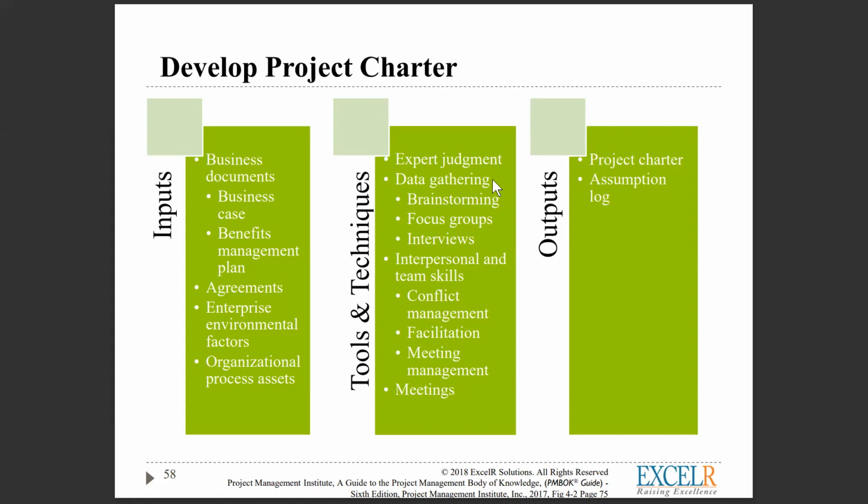Then the pre-sales team will prepare the effort estimation, cost, everything. And then they will prepare a technical proposal as well as a commercial proposal. Once those two things are done, they will submit the bid. The company that is rolling out this offer will call for a technical discussion, and then select the vendor: I have selected company X to deliver my project. They have agreed to the terms and conditions, everything. At that time, the project manager will get assigned from your company. And then he has to work with the stakeholders and prepare the project charter.